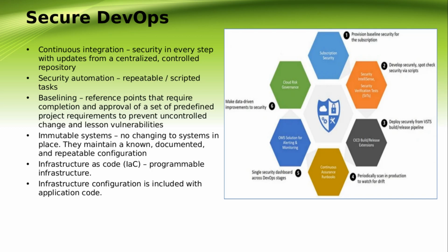Baselines provide the following. One is measurable progress points. Second is a foundation for change control in phases that follow. Third is a sound reference point for future projects, including intermediate as well as final points. A typical project contains baselines such as functional, allocated, design, several testing points, and product and operational. They can also be used to establish the required software and hardware components necessary for a specific release. In DevOps, baselines and metrics are typically used to record and track progress.